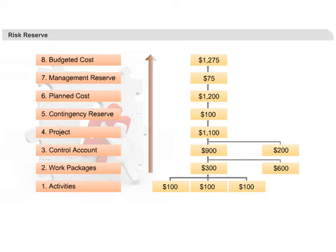Work packages are the last level of classification in a Work Breakdown Structure, that is to say, WBS. Below work packages, you only have activities in a WBS. Since managing cost at each work package level is quite inconvenient, generally more than one work packages are clubbed together to create a control account.